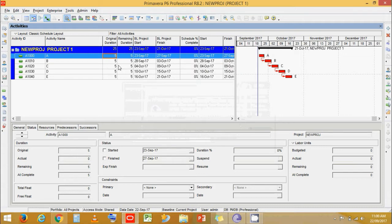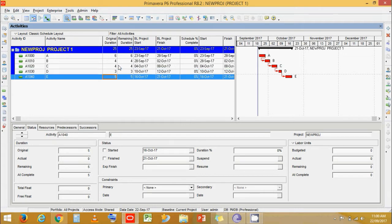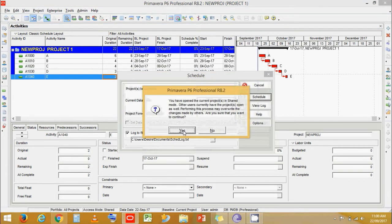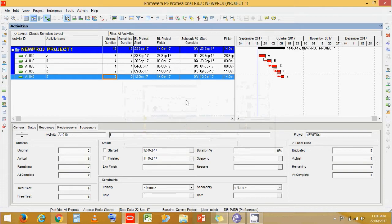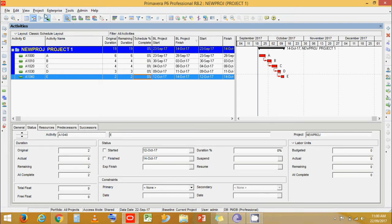Now let's give the activities some durations — two days each. Then let's schedule it and add a baseline to the project.